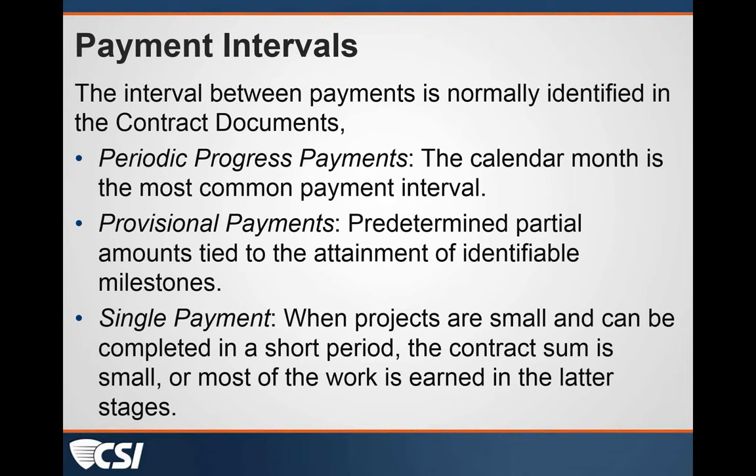Payment intervals. Typically, your contract documents will define the payment intervals. Periodic payments usually are done on a monthly basis, depending on the type of work and size of the project. That could be increased to twice monthly or even weekly. Monthly is typically what I see and typically what we deal with. Provisional payments are predetermined partial payments tied to identifiable and obtainable milestones.